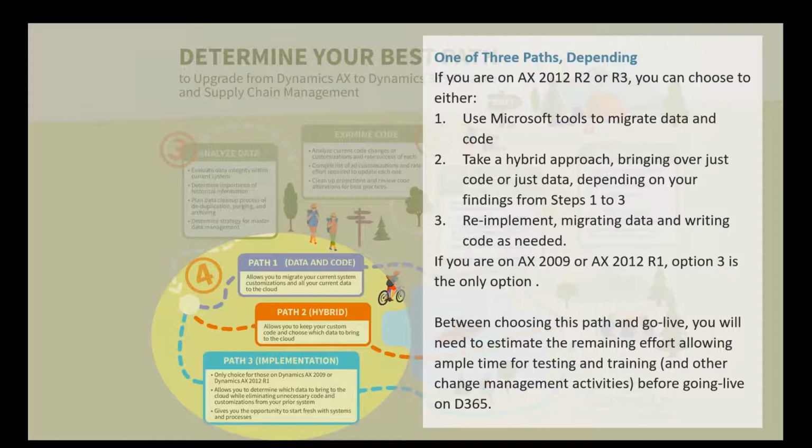Now, when we look at the hybrid model, which is much more common, that is where we may have a lot of the migration tools that are used to get to that version, but then we have custom processes that we've created to, for example, populate custom fields from the data, almost like you would do with a brand new implementation. But because we have those base records, we just go through and target updates to specific data sets. And that means as well that some of your code in your prior version won't port over, because we've identified in the code lifecycle really what needs to move as part of that particular process.